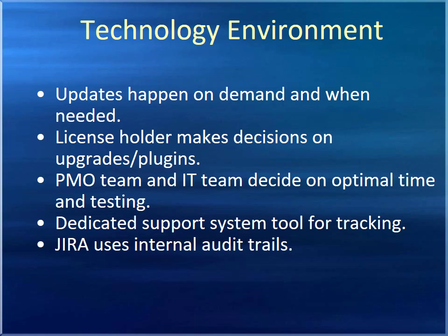When making a change to the CMS system of Jira, the license holder makes decisions about upgrades and plugins. Once a need is determined, the lead of the PMO team works with IT to determine optimal time and testing for the upgrades. The final sign-off for approval is made jointly between the directors of IT and PMO.